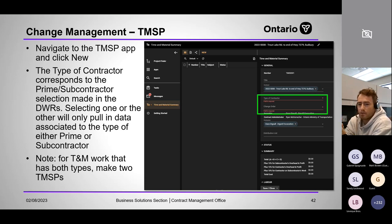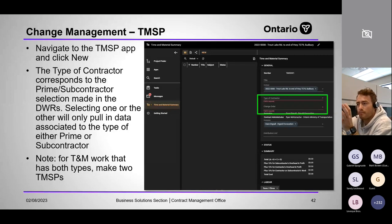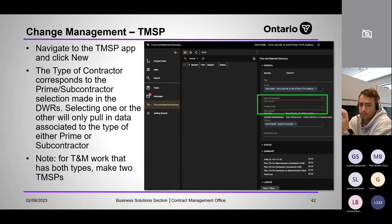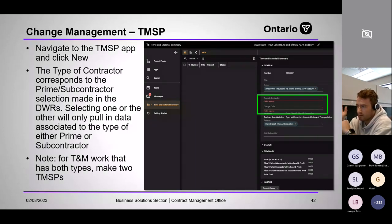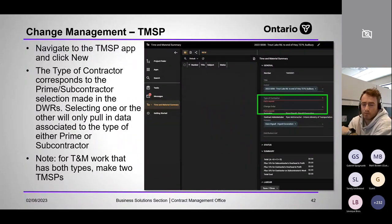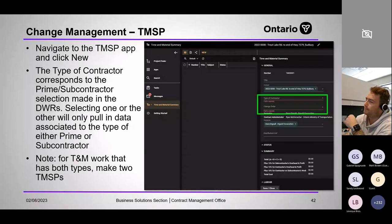If you have prime contractors and subcontractors on the same T&M change order, simply create two TMSPs: one for the prime — which will only pull in prime entries for that change order — and one for the subs, which will only pull in sub entries.